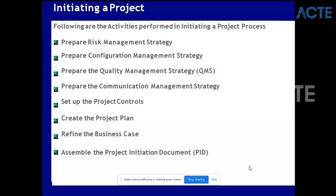Create a project plan - definitely you have to create a project plan: how many days it will take to design, develop, test, and put into operation. The project manager creates the project plan. Refine the business case - in startup of the project you only created an outline; in the initiation phase you go and refine it, because now you know the project duration, how many teams are involved, and the quality. Then assemble the PID - Project Initiation Document. The PID is a plan document where you put your risk management, configuration management, QMS, project plan - all items inside. PID becomes one document which will have all these items or links to these documents.